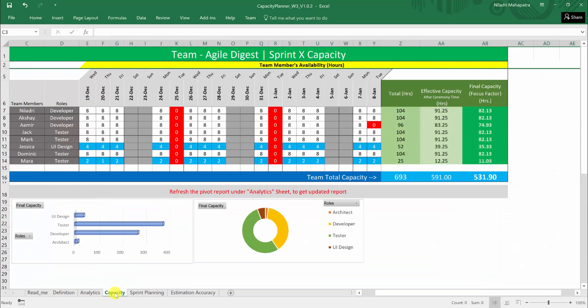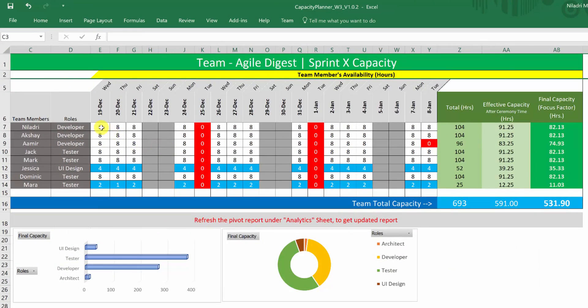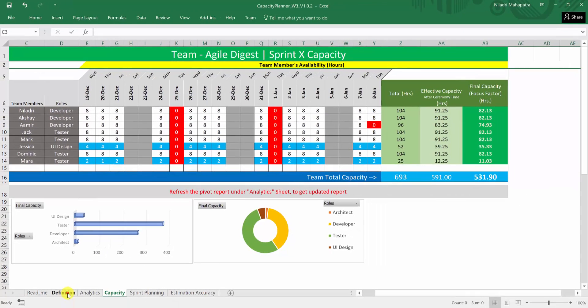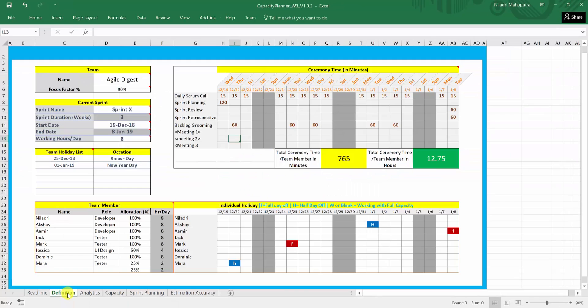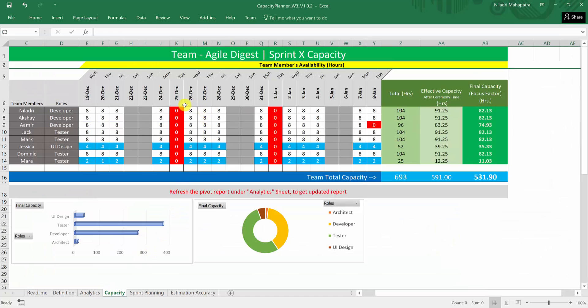So this is how it will be looks like. Now we will see what exactly it is showing. This red total full red is a company holidays. If someone is here that is actually zero and this zero is the full day off. If you see this person Amir on 8th of Jan has a full day off. So if you go into the definition sets this Amir is a full day off. But there was another full day off mark on 25th of this spring, 25th of December. As 25th, you already marked it as a company holiday, it will not creating any additional impact. So it is falling under it.